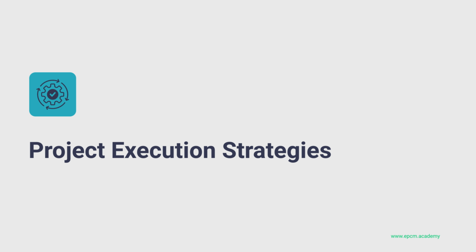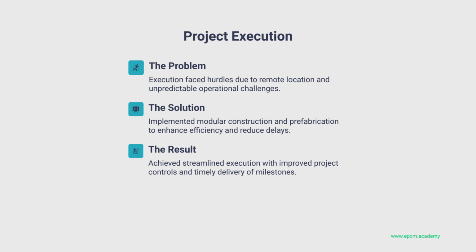They are. And it's not just about getting things delivered on time. It's also about being smart with costs. That's where value analysis and engineering come into play. Yeah, the quest for efficiency. How do they weave value analysis into the project planning stage? They propose conducting value engineering workshops during the design phase. These workshops bring together experts from different disciplines, engineers, designers, procurement specialists, to brainstorm ideas for optimizing costs without sacrificing quality or functionality.